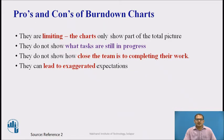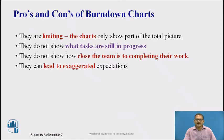Let us see the limitations. The charts only show part of the total picture. They do not show what tasks are still in progress, and they do not show how close the team is to completing their work. They can lead to exaggerated expectations that are worse than reality. Teams that run aggressive projects based on unrealistic or over-inflated timeframes can become easily disgruntled or lose their motivation when the project does not run smoothly.